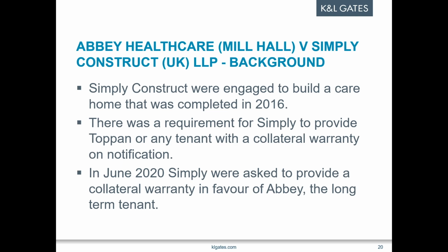In 2018, there were some fire safety defects, and Topham had engaged a third party to carry out remedial works. Those works had also been contributed to by Abbey, who were a long-term tenant. But the collateral warranties had not been entered into. They were entered into in June 2020. Practical completion of the works was in February 2020. It was actually, I think, October 2020, after even the remedial works were done, that Abbey's collateral warranty was entered into. So it was entered into after all the works had been done.